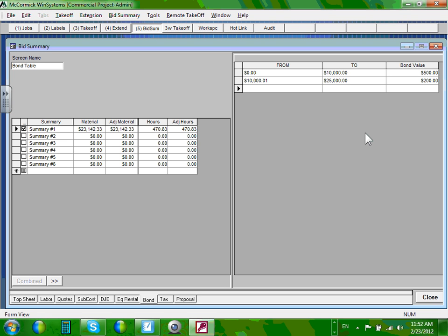It's like an insurance, but not really insurance. I want you to refer all these questions to our major estimator when they come, guys. So if you don't fulfill, the bonding company will pay the affected parties their share, and then they go after you in court or wherever to get their money. Okay, we got our bond. And we good with bonds?